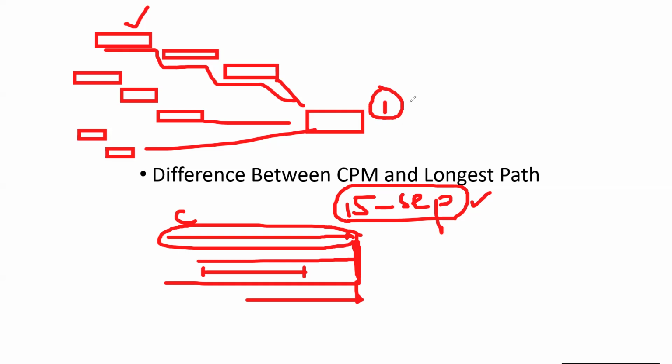I know that we have to follow this every time. But if we are assigning a project must-finish-by date, then every path which is crossing or meeting this deadline will be labeled as critical. In job interviews they are going to ask you such kinds of questions, so you should be very clear about that. Both ways are good, depending on your project situation.